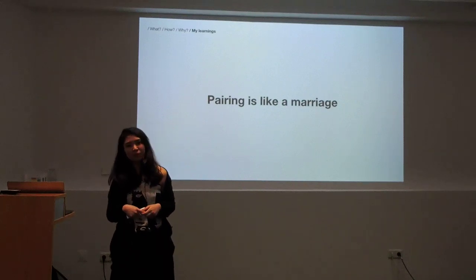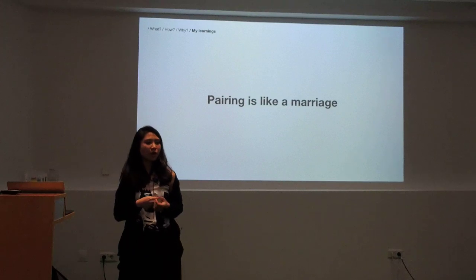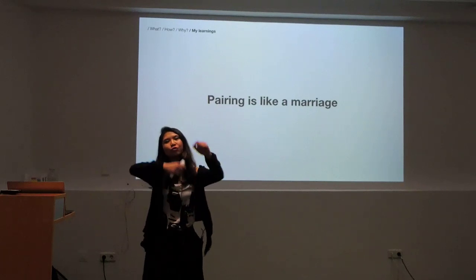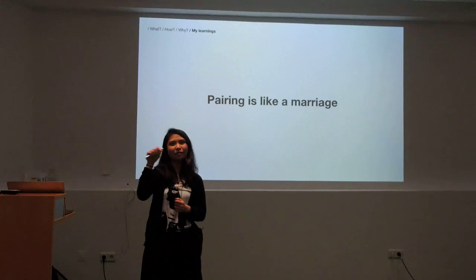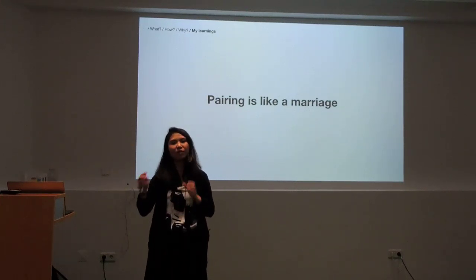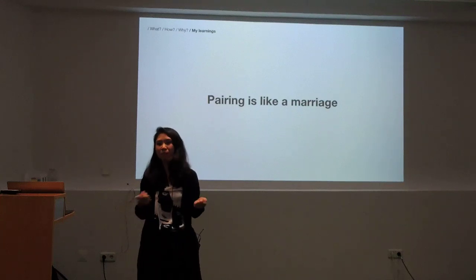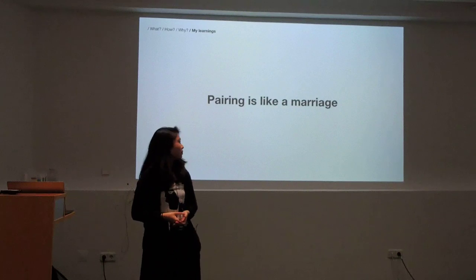One thing I practice with my pair is to have a retrospective. So this is something where you reflect on what you've learned, about what can be improved, and this can be done just two of you. What we do is we normally draw a sad face, then a not so happy face, and then a happy face. And then you really just write everything on the board. So you have it out visually for you to see. And this also means that you don't just focus on the bad points, but you also talk about the good things and what happened within the pair. So this is a very good way to really talk it out.